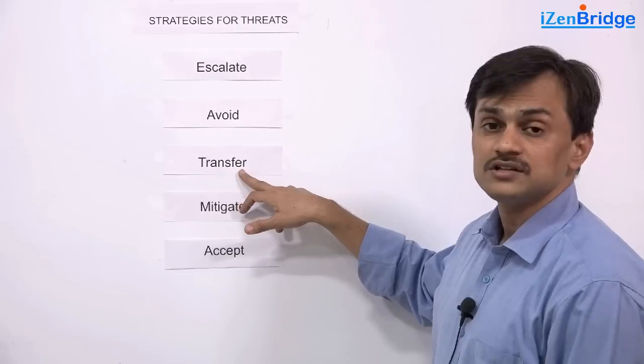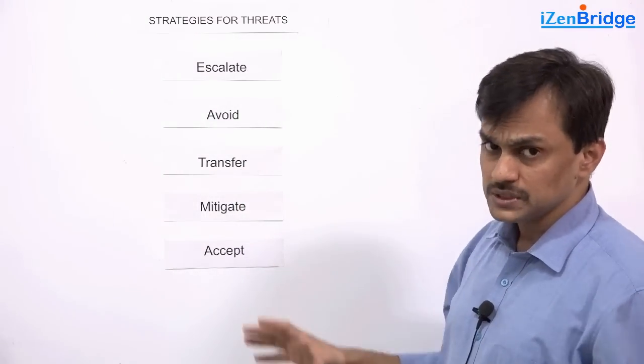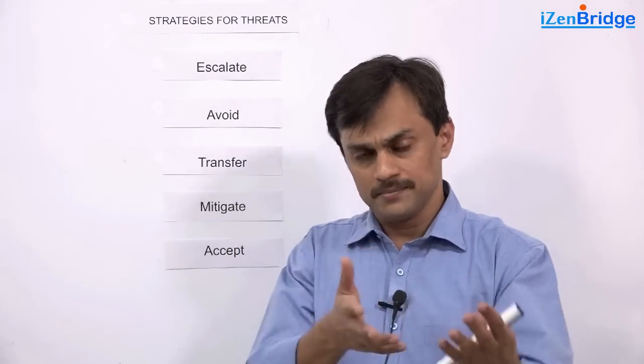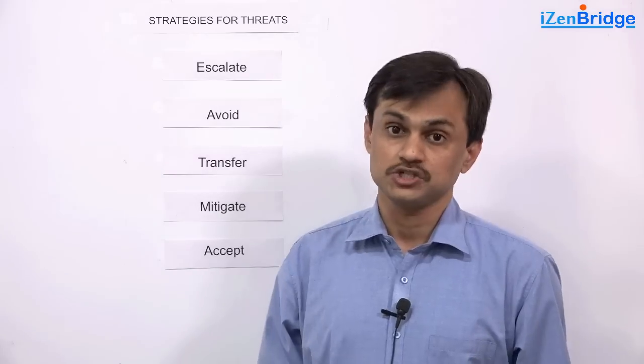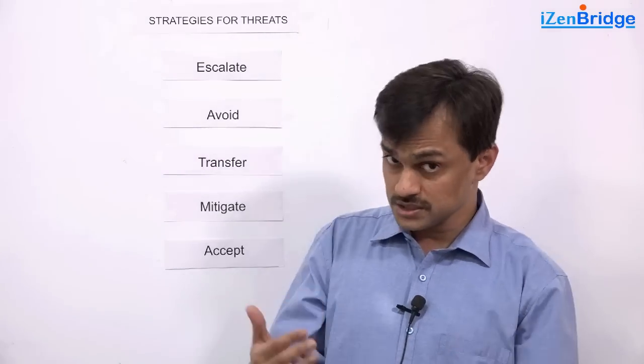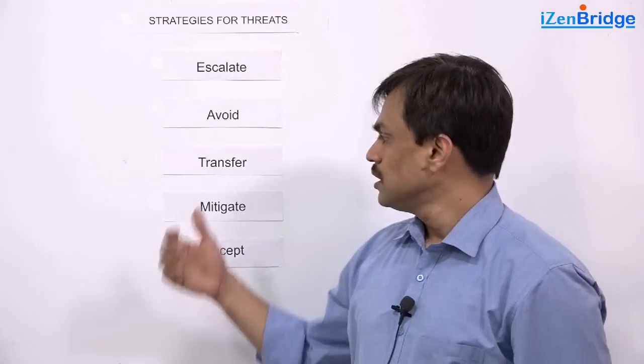You may do that in project context as well. You may not be able to take care of a particular area and you realize that can we get some third party who takes care of this work and we transfer this risk to them. Now, getting a third party, they may charge more. They may charge a premium on it because they are also owning the risk. They will charge the premium of owning the risk.